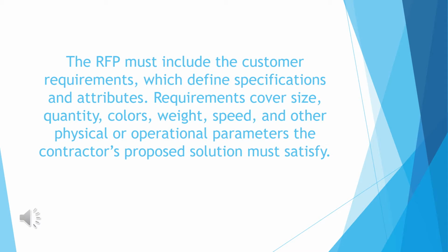The RFP must include the customer requirements, which determine specifications and attributes. Requirements cover size, quantity, colors, weight, speed, and other physical or operational parameters the contractor's proposed solution must satisfy.